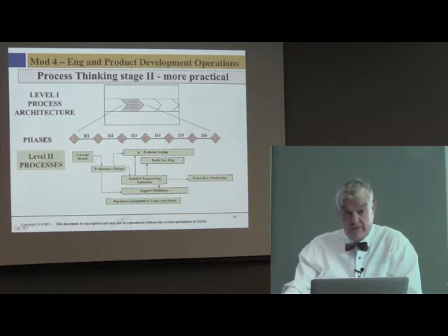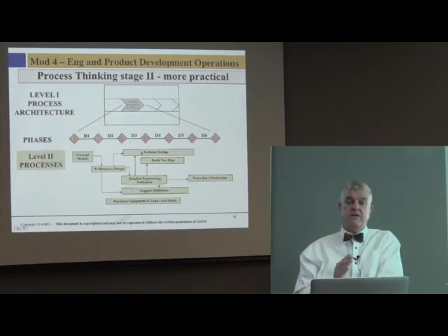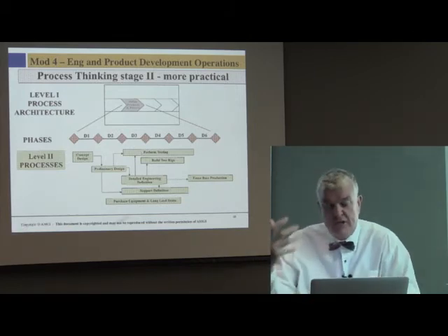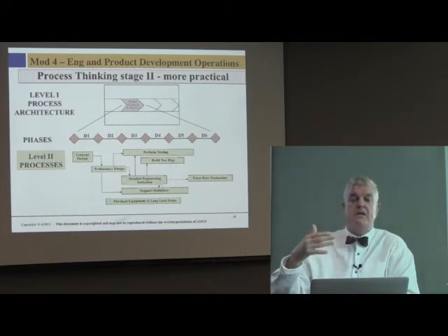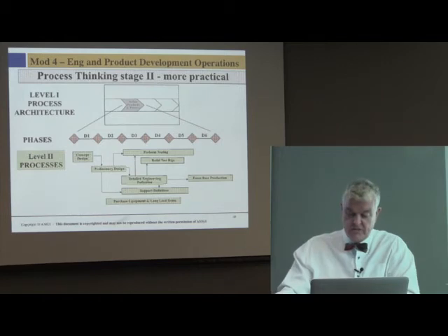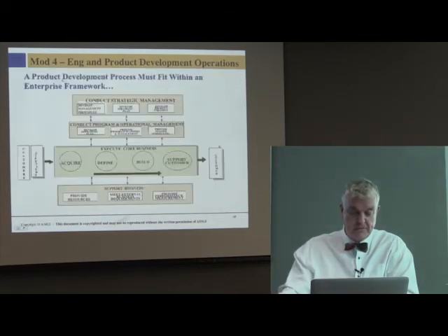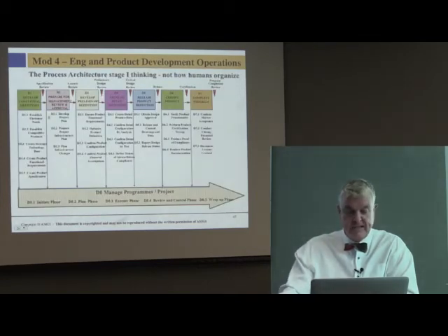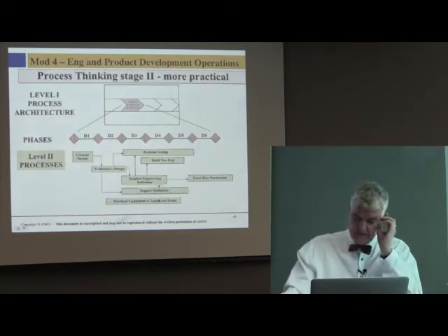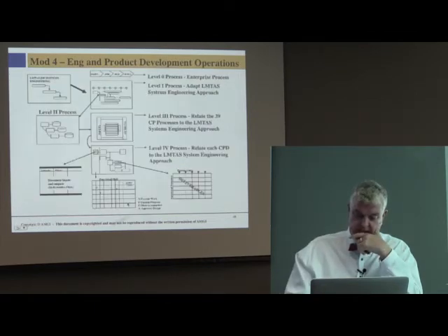And you're inheriting risk, but you're also managing that risk of bringing work up front with experiential judgment, but also you're reducing the lead time. You're reducing the time to market. So you're also keeping a lot of these people busy that are working in this by getting them to start ahead into the preliminary definition. You see it here. I'll talk about all this in the class.